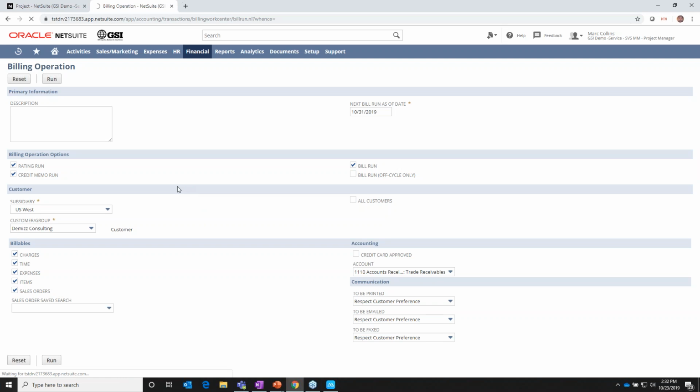Now, this can be automated in the background, so nobody in your organization needs to take any action for, say, a monthly billing run on any of your customers. This billing operation is grabbing charges for time and material customers, the same as it's achieving milestone billing impacts for the milestone client that I'm taking a look at right now.